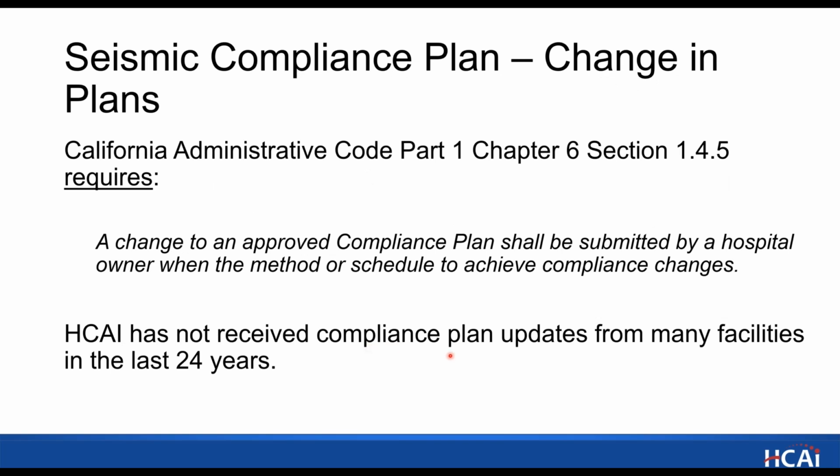One thing that has also been a requirement in our California Administrative Code is that if there's a change to the compliance plan, then it needs to be resubmitted.